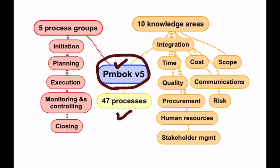...into 5 process groups of Initiation, Planning, Execution, Monitoring and Controlling, and Closing. The PMBOK has 47 processes grouped into these 5 process groups. The same set of 47 processes are again grouped into 10 knowledge areas of Integration,